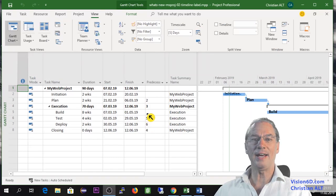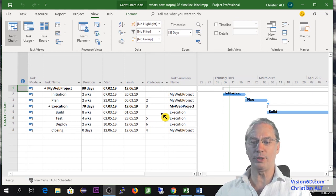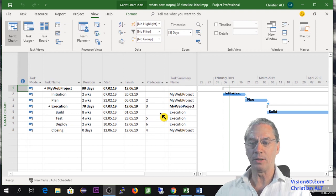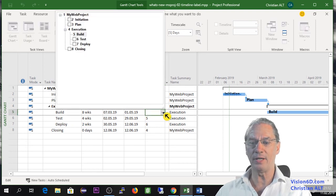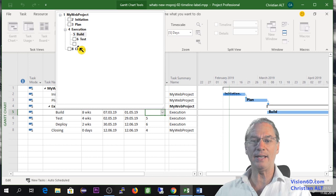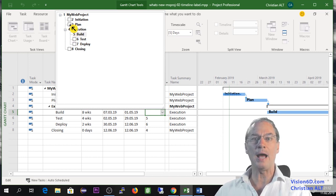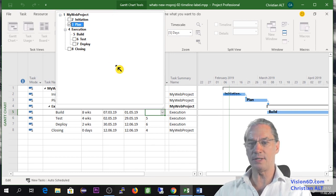Another addition is that here, if I want to add a predecessor for my task, which is called Build, you will see that I have a menu that comes now here. And I can choose from this menu. So for example, for me, I'm going to say that the predecessor is the plan number three.